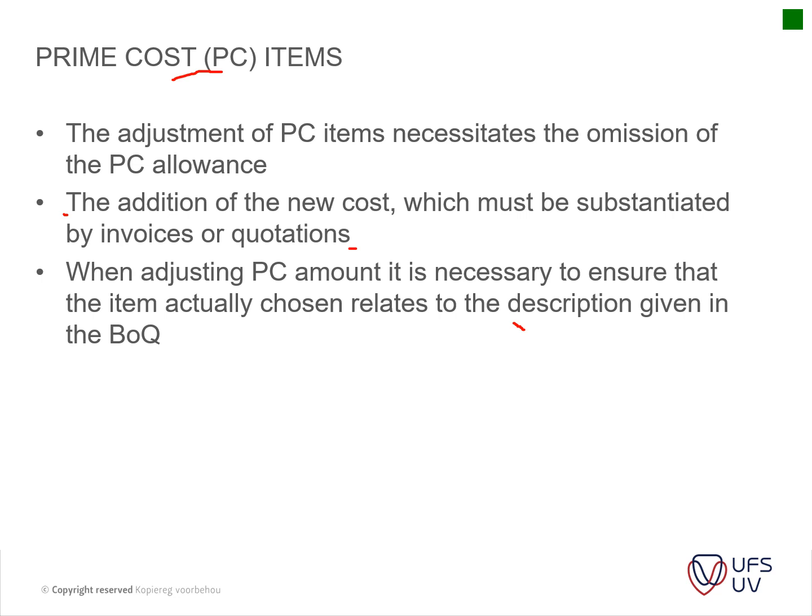Usually when it goes out on tender, when it's a smaller project and there's no mechanical engineer appointed, then what you would do is you would put a PC amount in the bill of quantities, and then when you get onto site or the contractor is appointed, he has to supply you with three quotations, and then you have to evaluate the cost and the design of that installation. Okay, and then the contractor has his markup that he puts onto the actual amount that goes to the supplier.